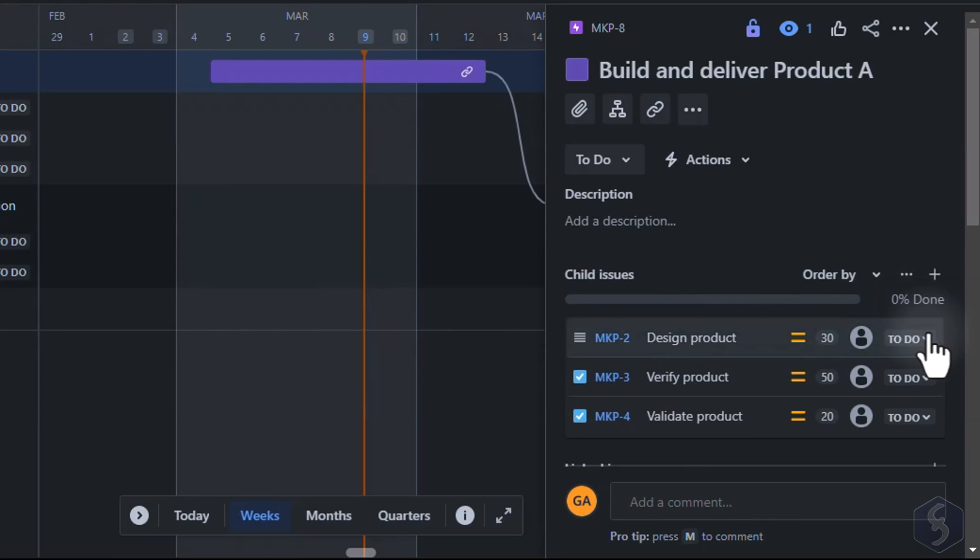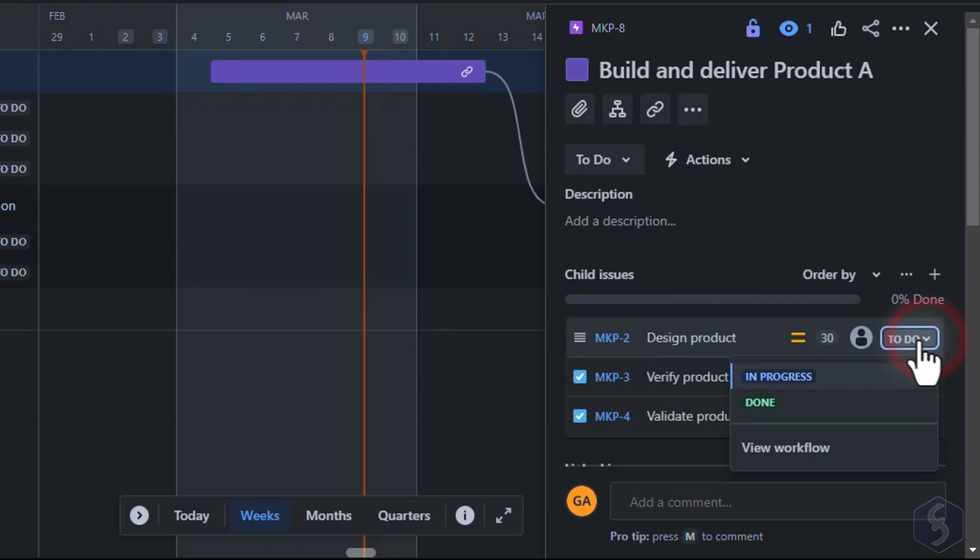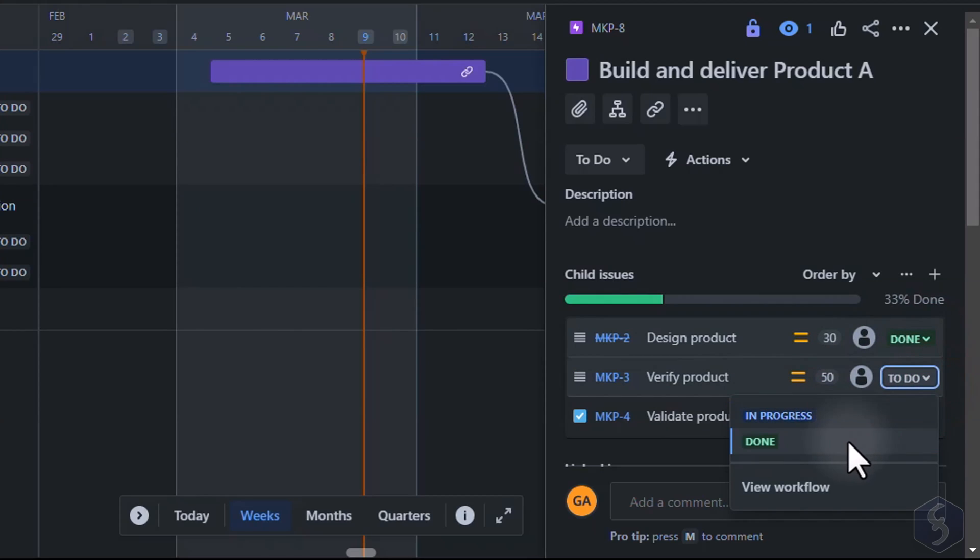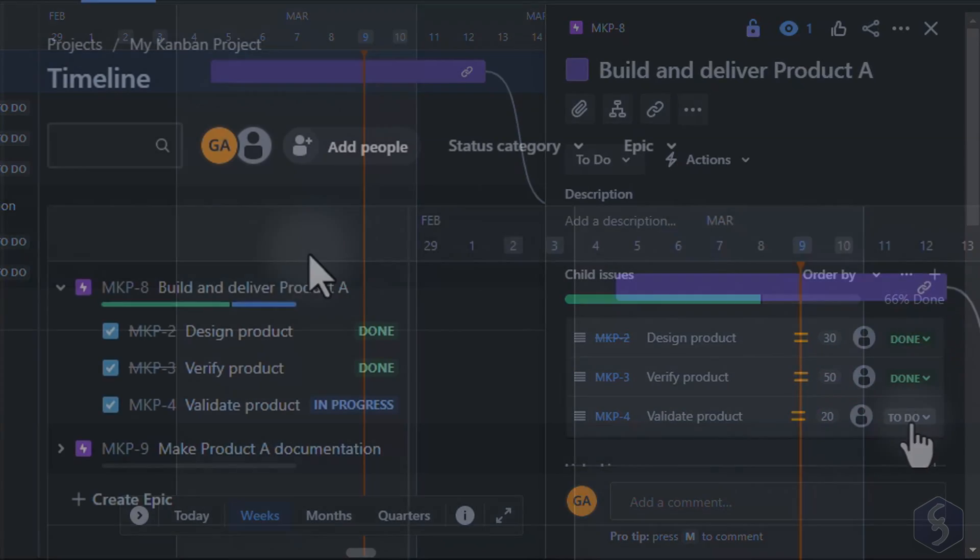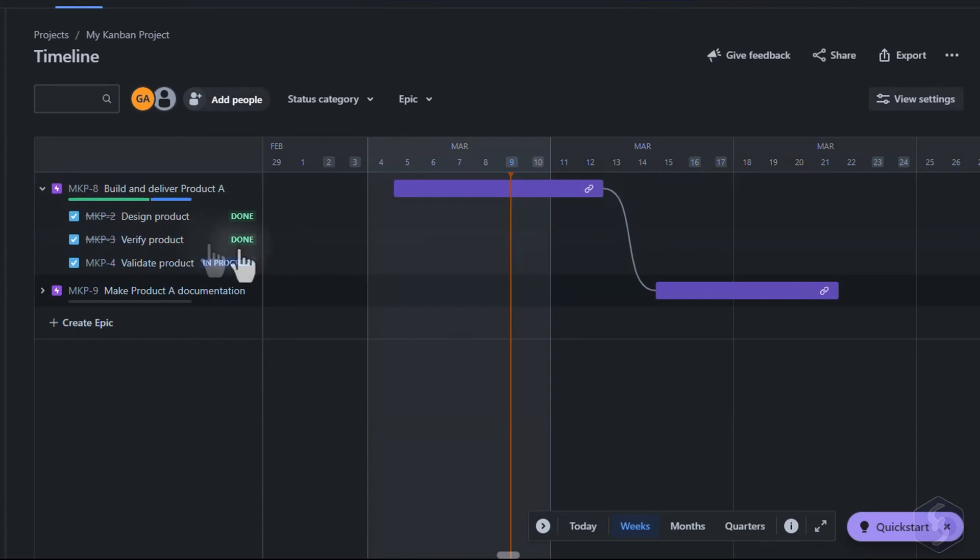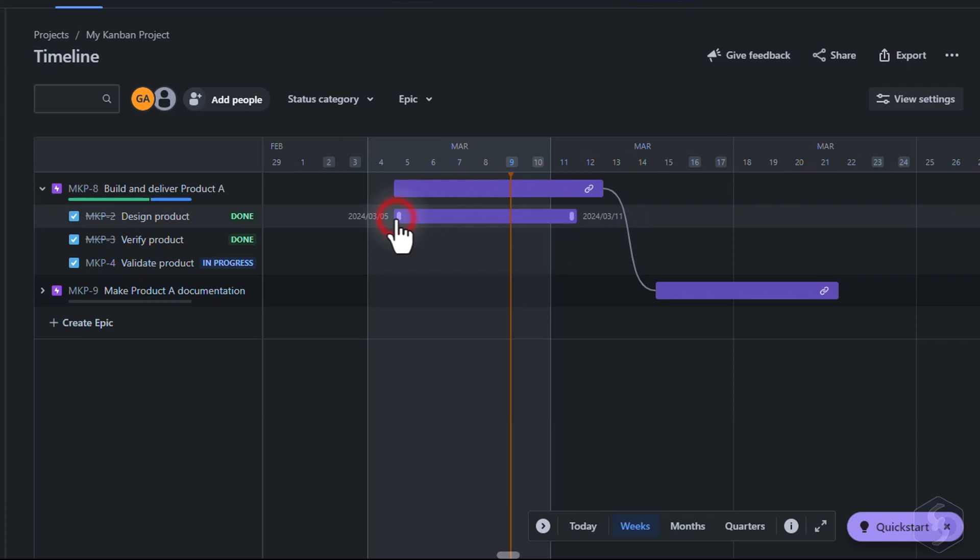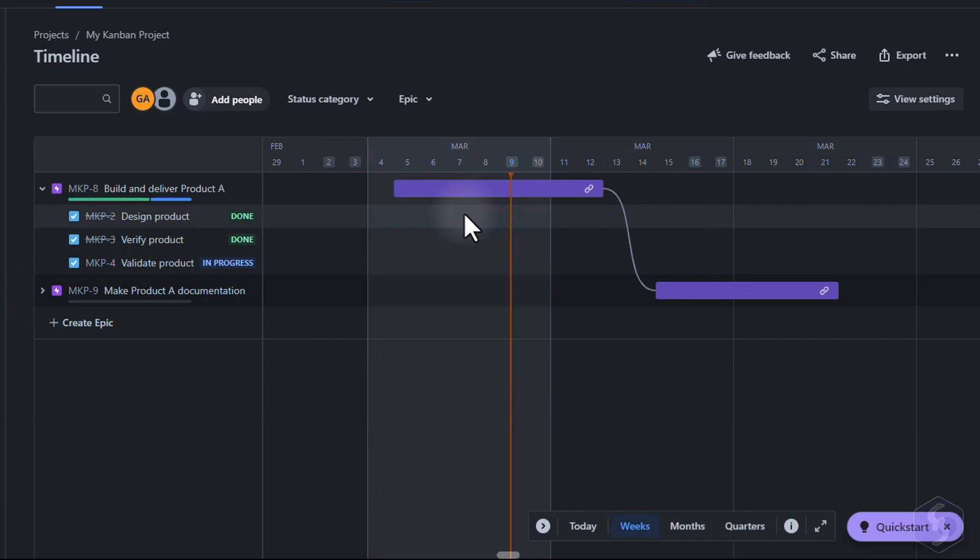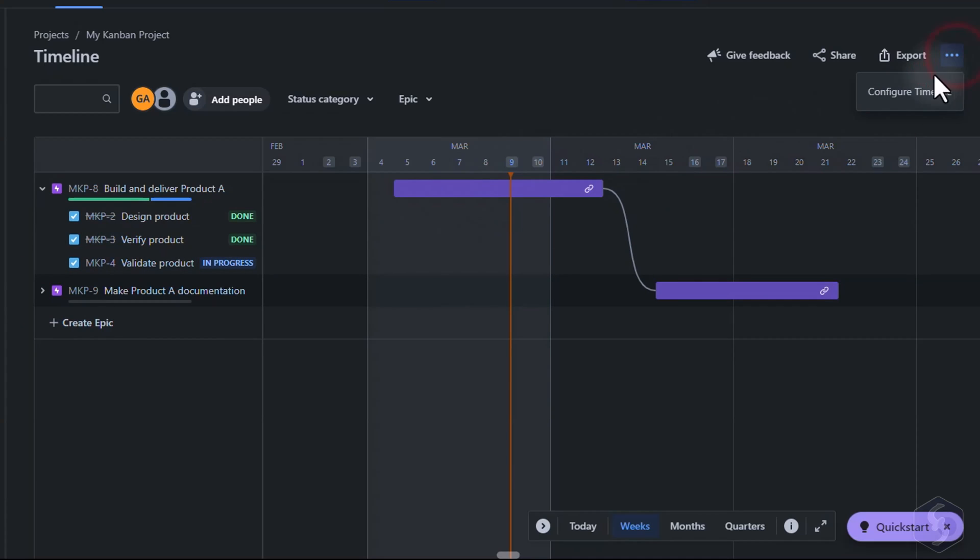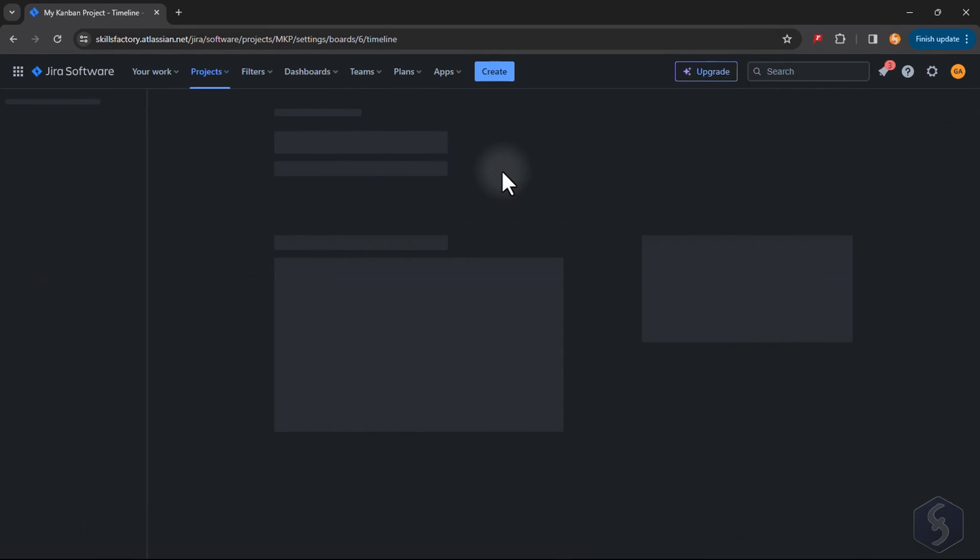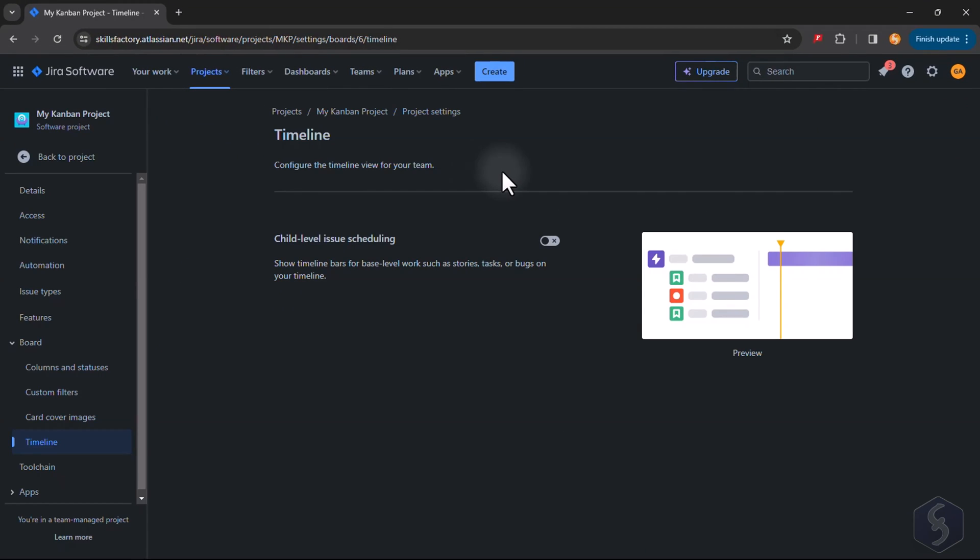At this point the Epic item displays a progress bar based on its issues statuses. You can also place the child issues on the timeline by clicking on it and drop blocks assuming the same color of the Epic item. If you can't do this make sure to go to Configure Timeline on the right and enable Child Level Issue Scheduling.